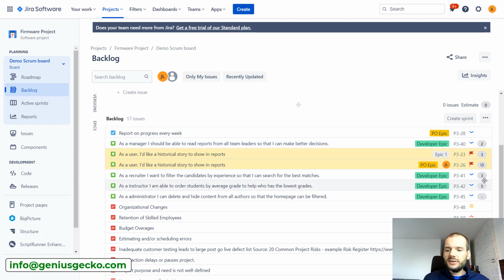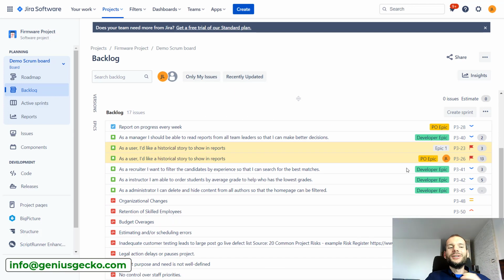Usually estimation is done by the team. You can look up, for example, techniques like planning poker, which is pretty popular to determine the size of a task. For us to do the planning, we need to know how much work we're picking up into a sprint, right? We cannot just put everything there, because obviously we won't be able to deliver everything within 2 weeks, which I set for the sprint. So for this, we have the story point estimate.